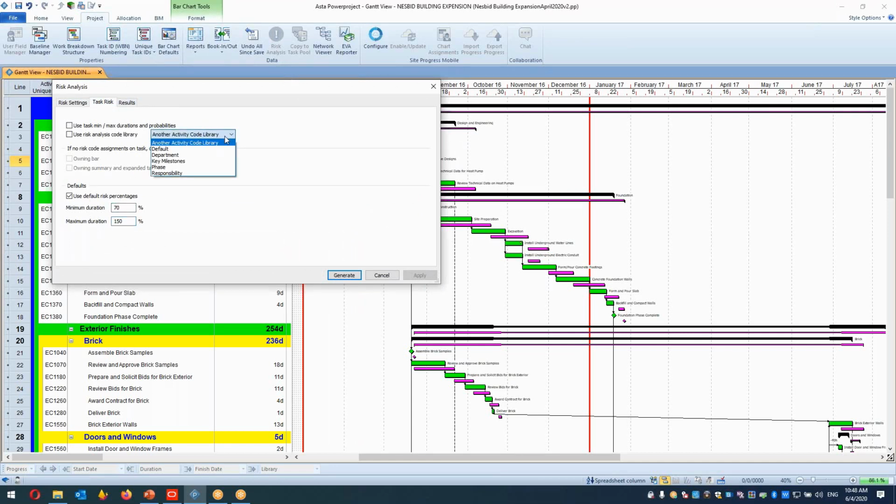By the way, if you want, you can apply design activities 80%, 120%, procurement activities 90%, 110%, and construction electrical works 70%, 100%. You can also apply them separately. For any specific activities, you can also apply it by using the code libraries. Let me explain how it works.